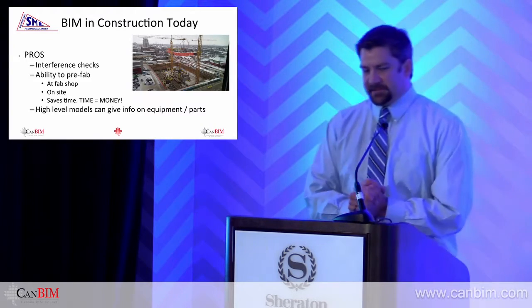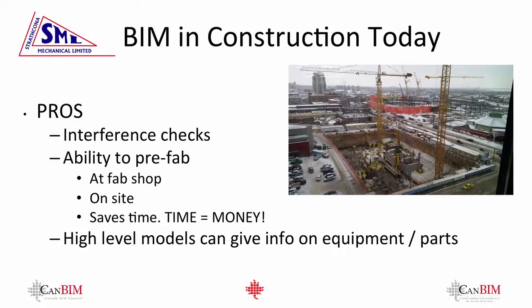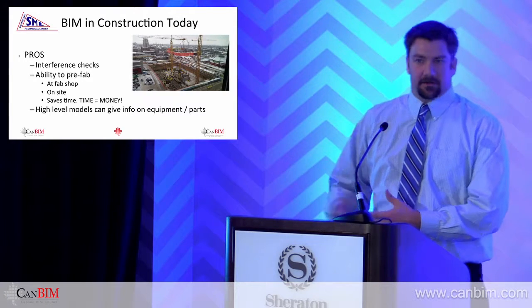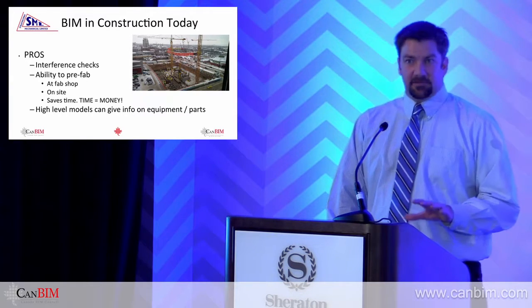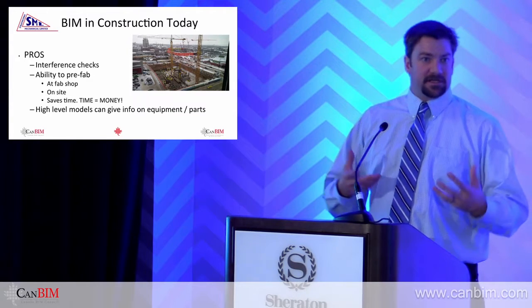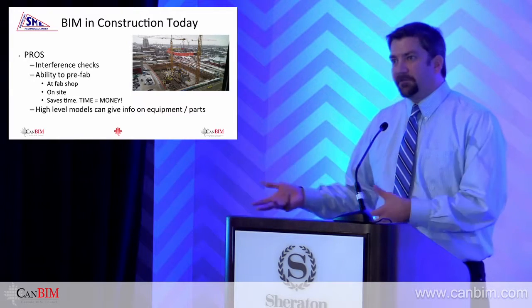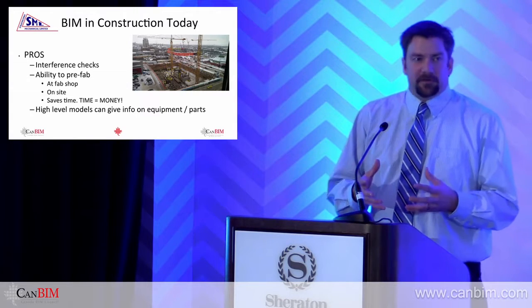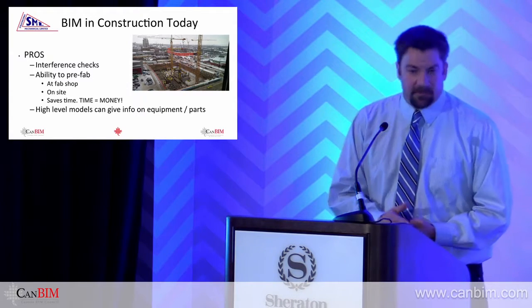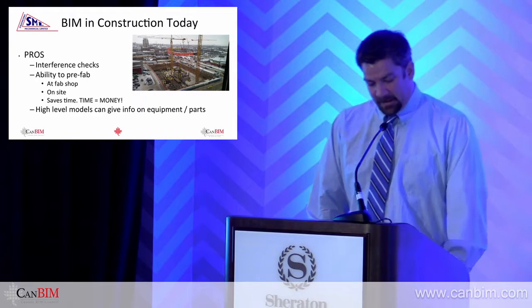In general, with the projects that we've been seeing, the pros obviously are the interference checks. That is one of the big ones. Are we going to run into a post, a wall? Are we going to be in the way of an electrical contractor or other contractors in general? The other benefit that we obviously see is with the mechanical rooms that are so congested. If we are able to prefab some of those spools at our office or a little bit off-site and bring them to the mechanical rooms to fit together like a puzzle, it would save us a tremendous amount of time, and obviously saving time, it will save us money.